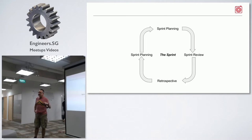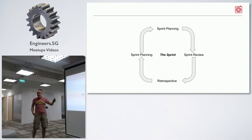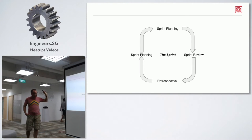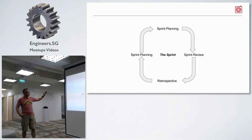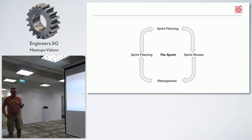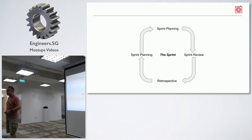At the heart of Scrum is the whole idea of the sprint. The sprint really is a cycle: sprint planning, sprint review, retrospective. What you have is a cycle in which you plan out a sprint, execute the sprint, review the results, demonstrate that you've delivered, conduct a retrospective, and then go on to plan another sprint. This is the ongoing process you're going through.